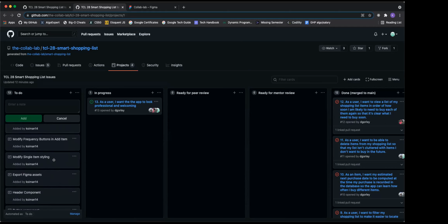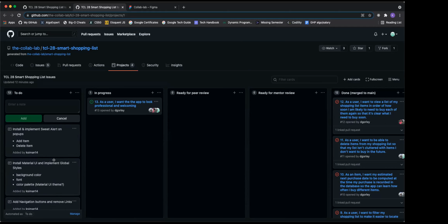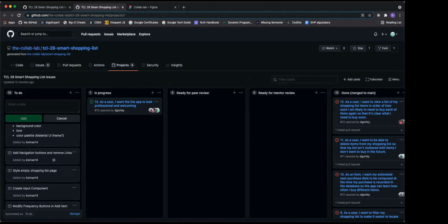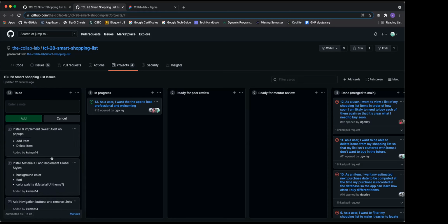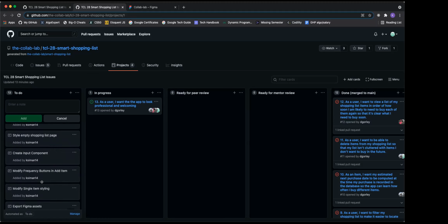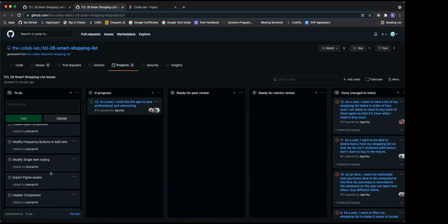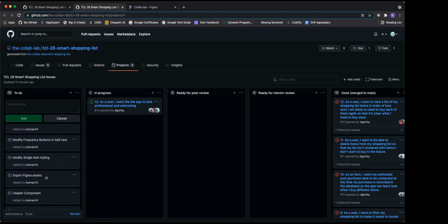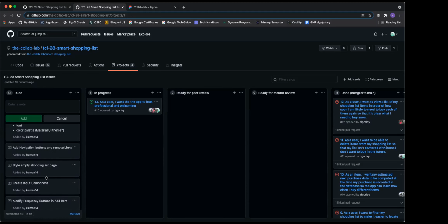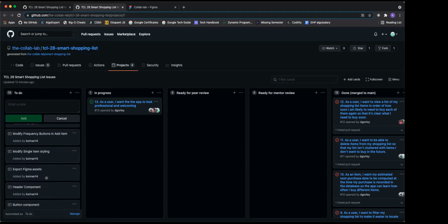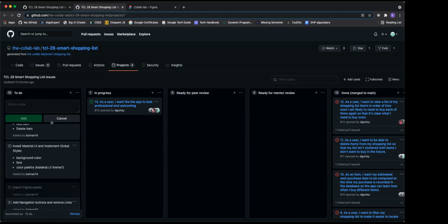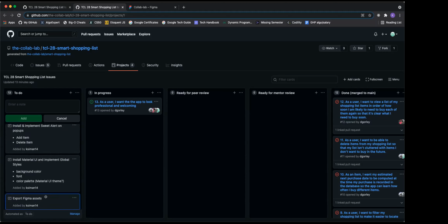Are there any other dependencies that you see in here of the order in which things have to happen? Just trying to shift from story making mode now to prioritizing mode. I think the Material UI one will probably be the first thing everyone needs to complete, because that sort of blocks everything else. But other than that, I think anything else is not blocked. Just the Material UI and the design ones.